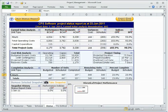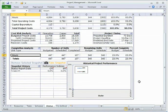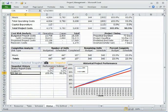Further analysis includes actual, budgeted, and projected values for project cost risk, timing, and completion based on actual data and predictions made from the calculated indexes. Period snapshots of the key indices for the project can be taken to give a clear view on the trend of the project performance and monitor reactions of the project to actions taken.